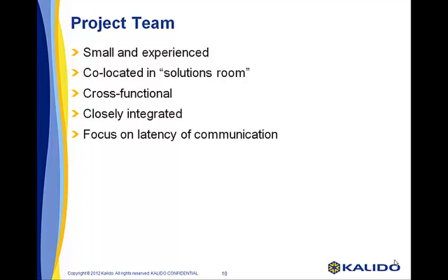The main reason for this is that when you're driving such short deliverables, communication latency has a much bigger impact. Waiting for a day for someone to respond isn't a huge problem in a 9 or 12-month project, but on a 3-month project, you've burned through just over 1% of your implementation time waiting for a response.